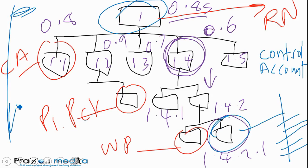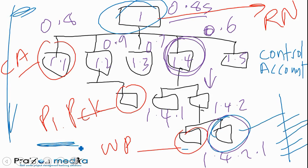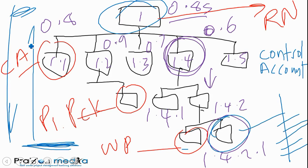You could also start from the lowest level when you don't know the work that well. That's a bottom-up approach. The bottom-up approach is not typically used. It's usually the top-down approach that's used.